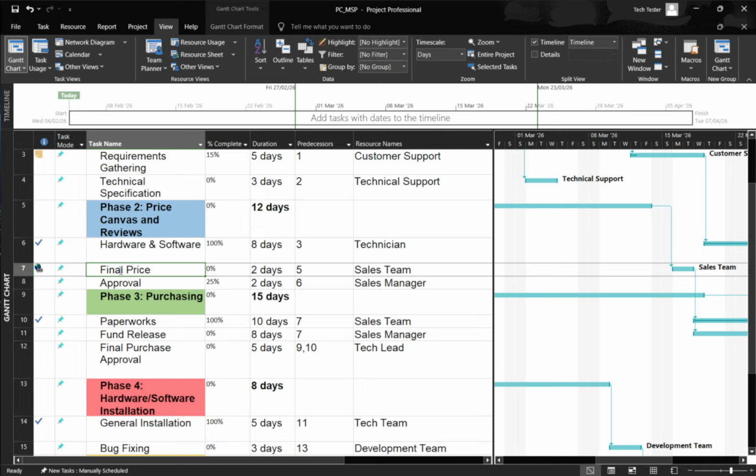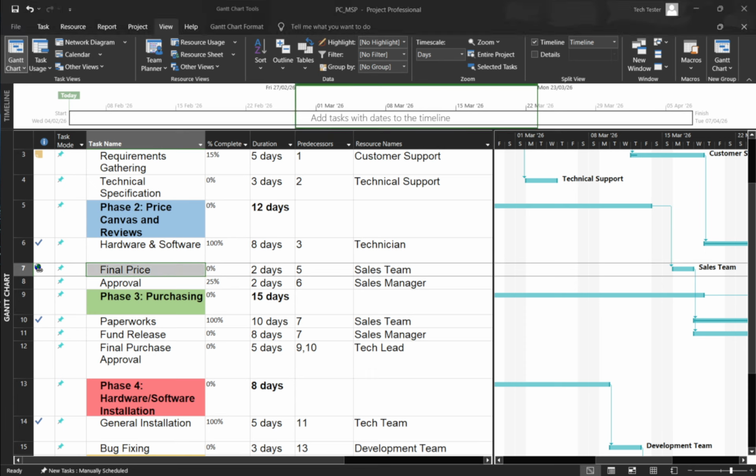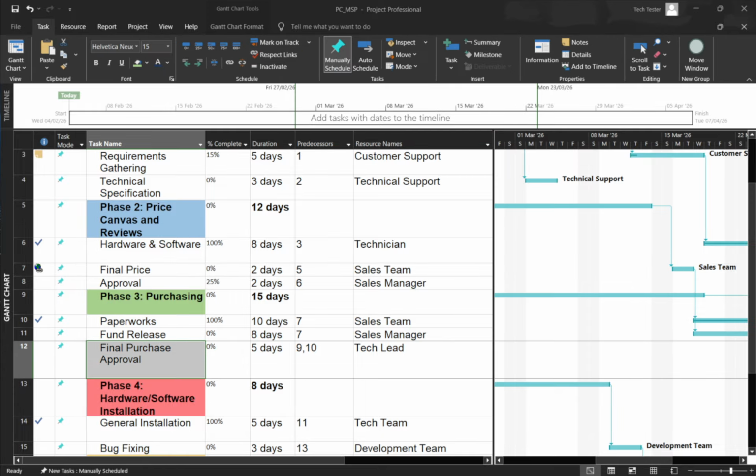Now, if you prefer to edit links directly in a table or add several at once, use the hyperlink fields. Switch to a sheet view, then go to View, choose Tables, and select More Tables. Pick the table named Hyperlink and click Apply. Your grid now shows hyperlink address and hyperlink text columns. Type or paste the URL or file path into hyperlink address. If you want a cleaner label to appear, enter it in hyperlink text.